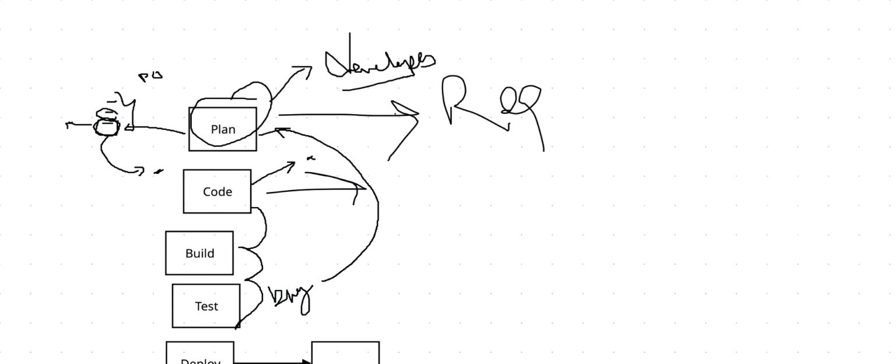So we call this a Kanban board. Basically, it will track the status of all tasks. When this tester is adding a bug task, it will go to backlogs. And then when the task is picked by a developer, it is called in progress. When the task is completed, the status will move to completed.